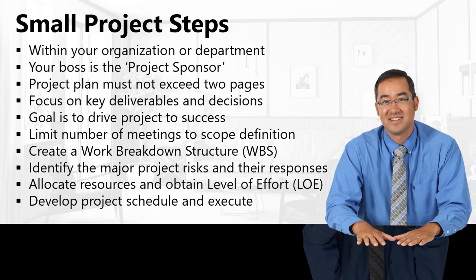The goal is to drive the project to success. To do so, limit the number of meetings to scope definition — sit with your boss, who is the project sponsor, and create a scope. After the scope is created, build the work breakdown structure, known as WBS, where you detail out the tasks, activities, and subtasks.